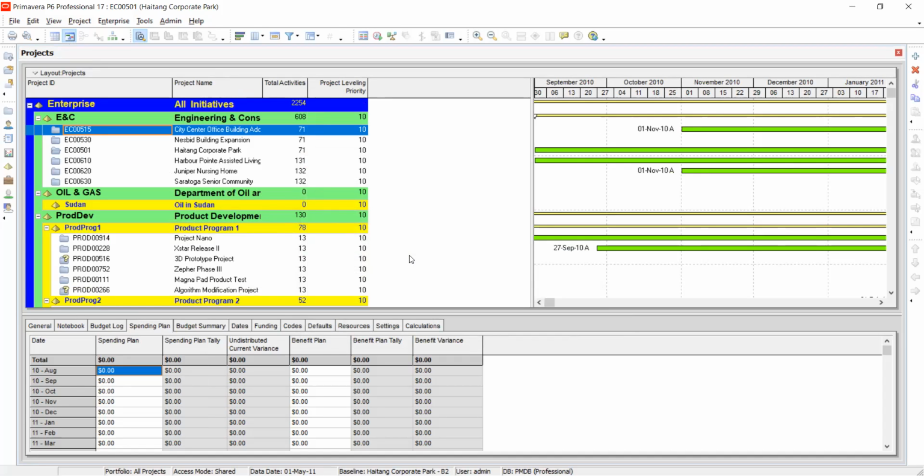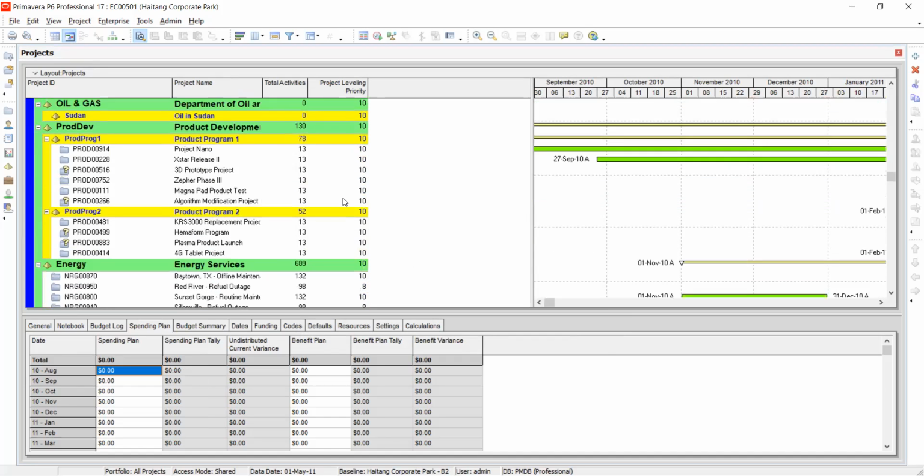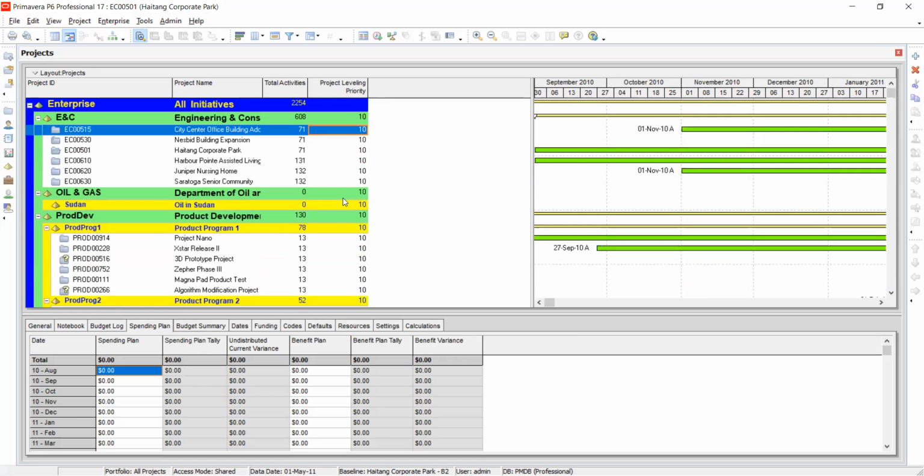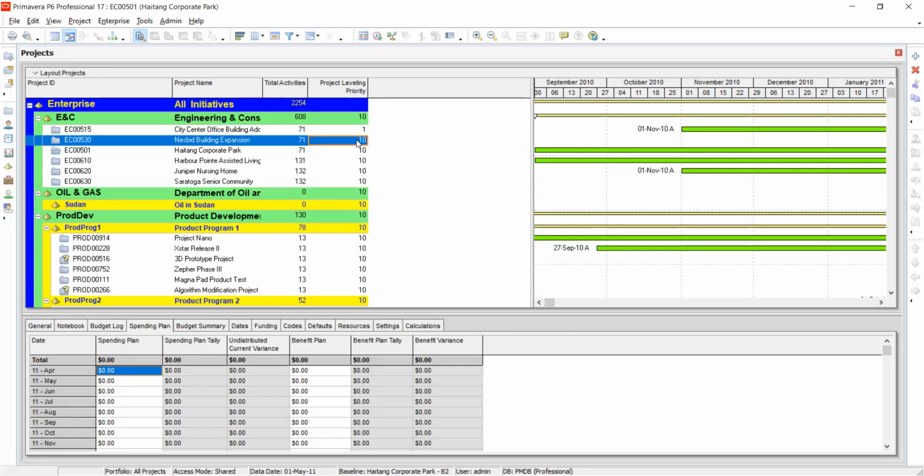Yeah, so as you said, now also here, don't give to levels, don't give to EPS, just give to project. Yeah, so this number can go up to 500. Yeah, so the higher the number, the lower the priority. The lower the number, the higher the priority. Like if I say 1 has a higher priority than 10.